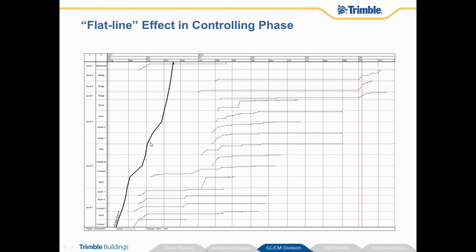What should have been 4 months of work has spanned across nearly an entire year of construction for just the framing of the walls. And again, this is part of that as soon as possible management methodology that we've seen. When the location's ready, when that location's open, let's just do as much work, even if it's only 5%, as opposed to waiting until that whole entire location could be ready for us, and then we can move those resources onto the most appropriate location next to manage that variability, to manage that flow.